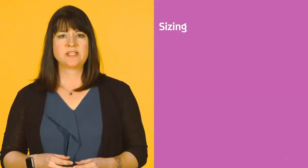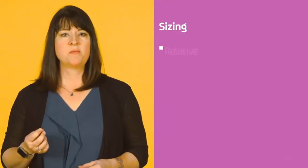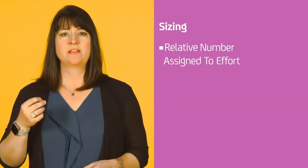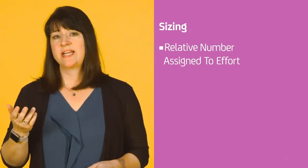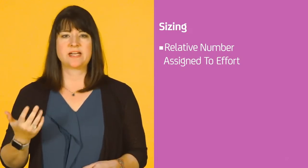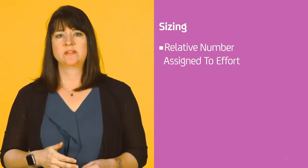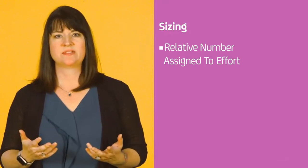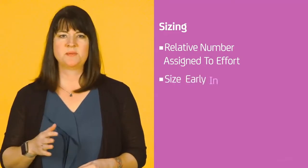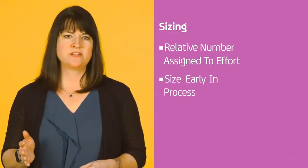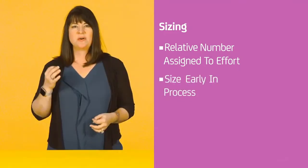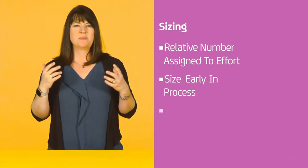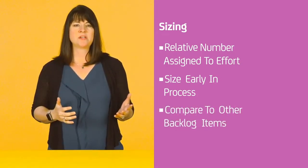Sizing refers to assigning a relative number to indicate overall effort by the whole team, including designing, developing, testing, and more. The goal is to keep it simple. We size early in the process before we need precision, so we seek only a relative size: how does this backlog item compare to others?